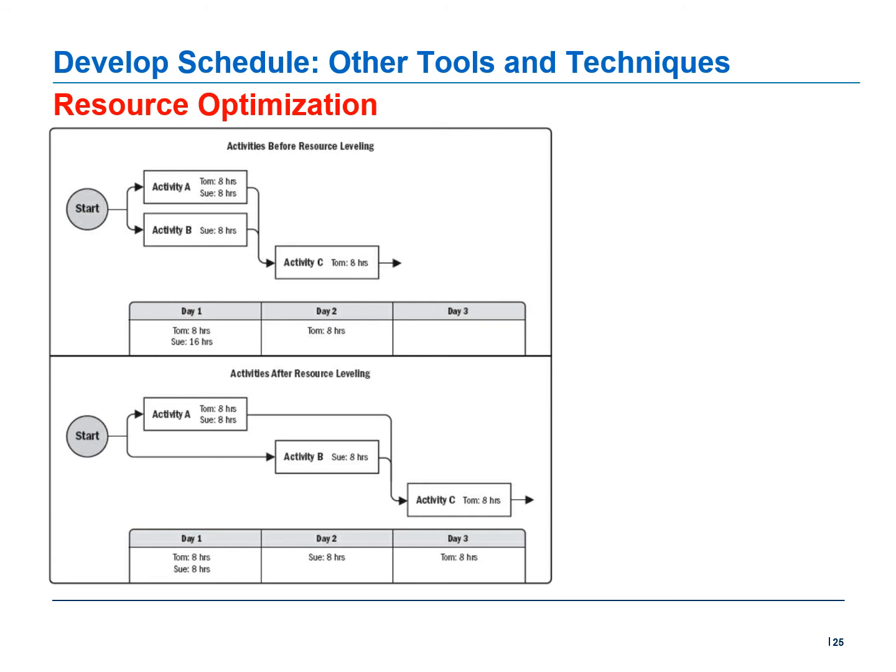Examples of resource optimization techniques that can be used to adjust the schedule model due to demand and supply of resources include but are not limited to resource leveling. Resource leveling is a technique in which start and finish dates are adjusted based on resource constraints with the goal of balancing the demand for resources with the available supply.